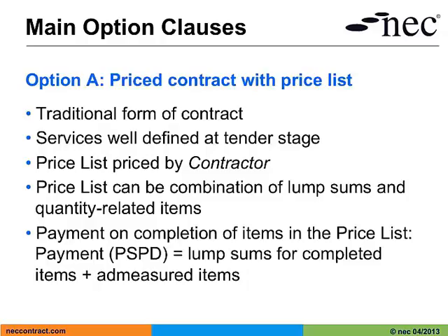Payment, which is something we refer to as the price for services provided to date, is equal to lump sums for completed items plus any ad-measured items. Note that in the price list, we will treat months as quantity-related items.